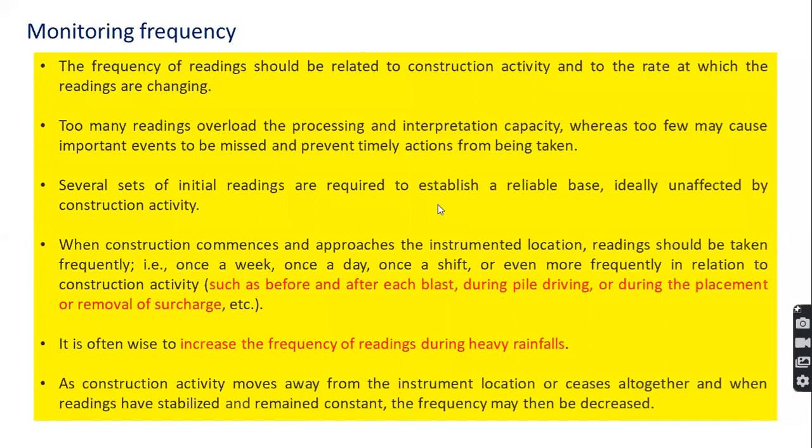The monitoring frequency: there are general guidelines, but the frequency of reading should be related to the construction activity. If the construction works are going very slowly, you don't have to take very frequent monitoring readings. And it has to be related to the rate at which the readings are changing. So if the readings are changing frequently, we have to take more readings to capture the behavior.